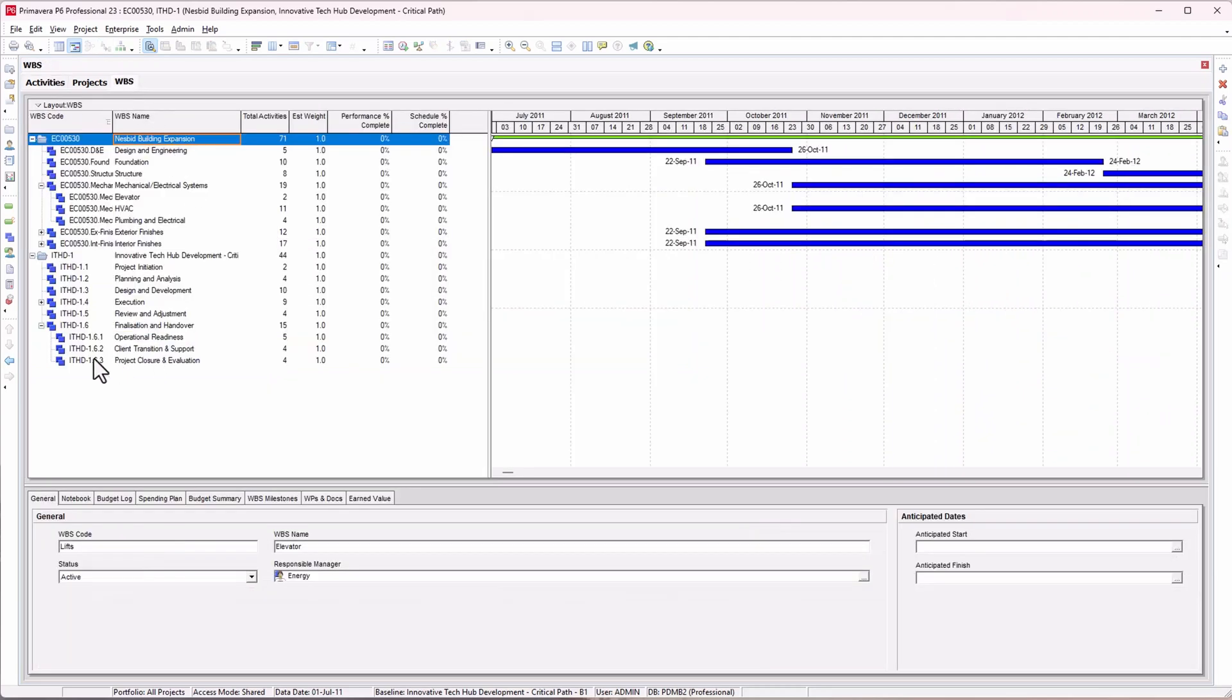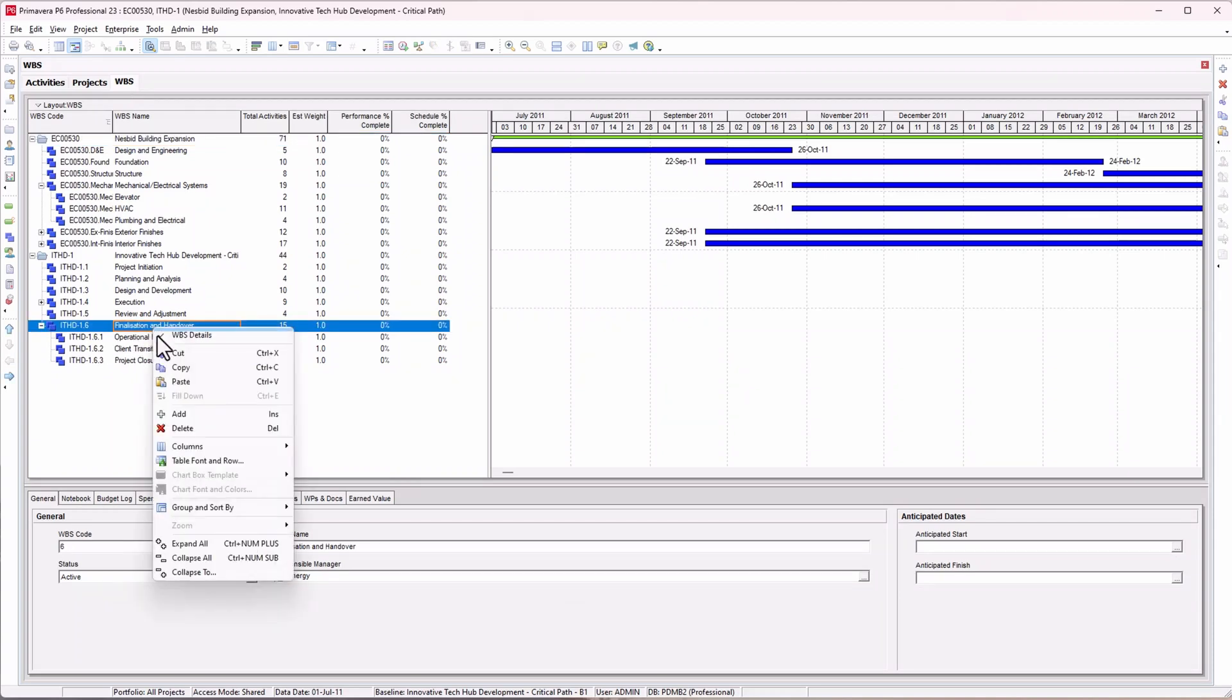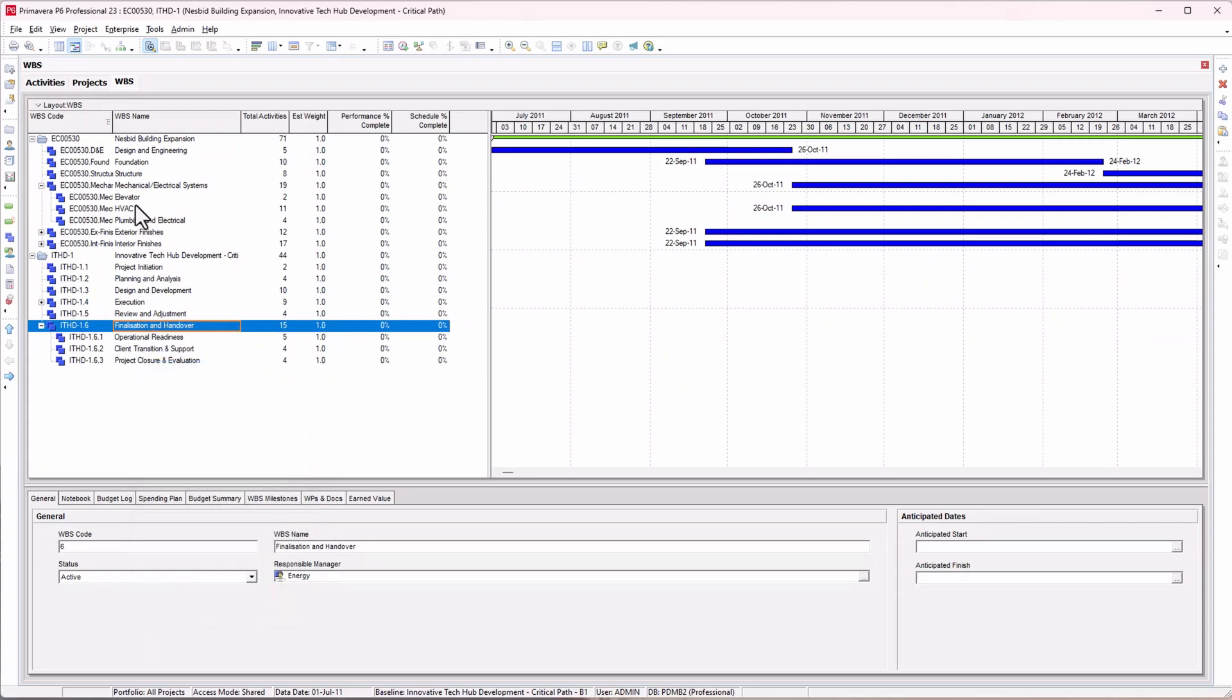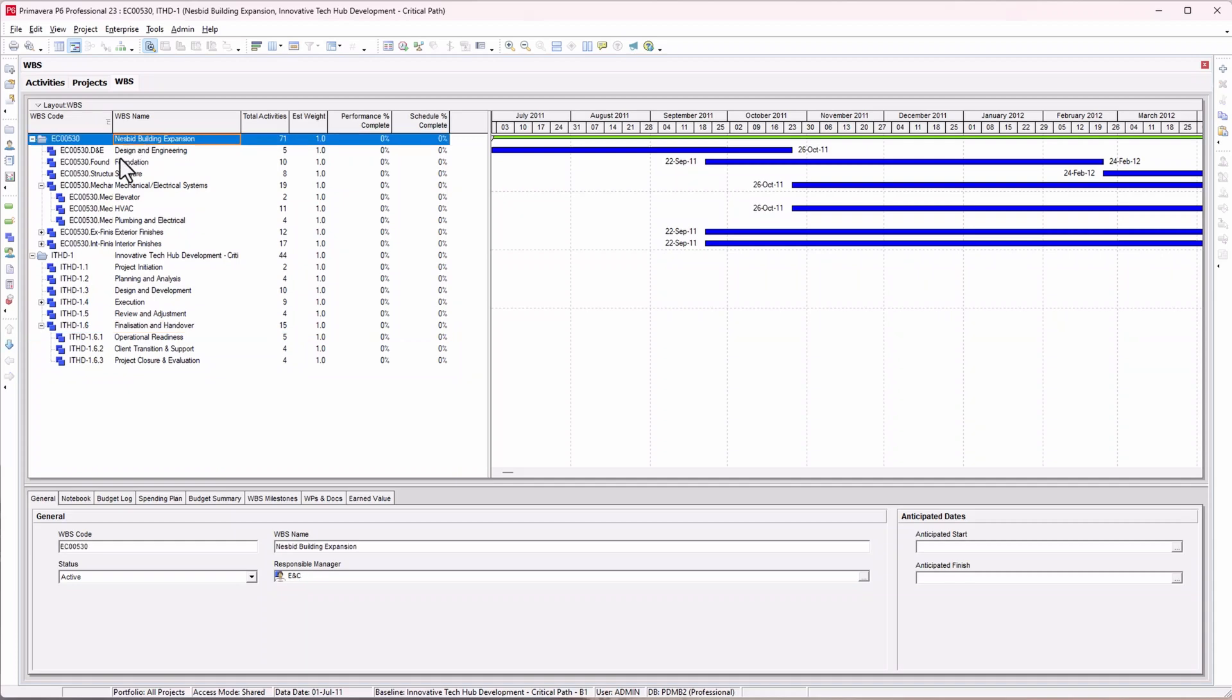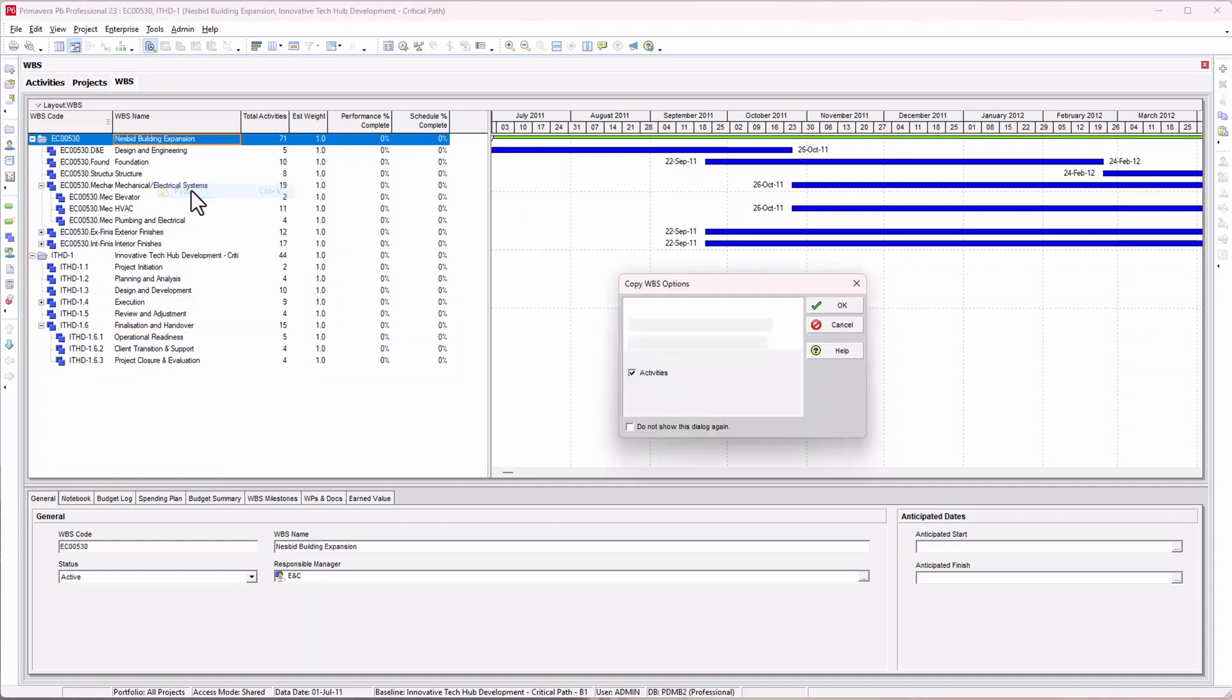Let's try one more time in the WBS view. Let's move finalization and handover from here to the other project, the building expansion. Click copy, then go to that project. Let's say I want to put it at the highest level. I'll click on the project and paste.